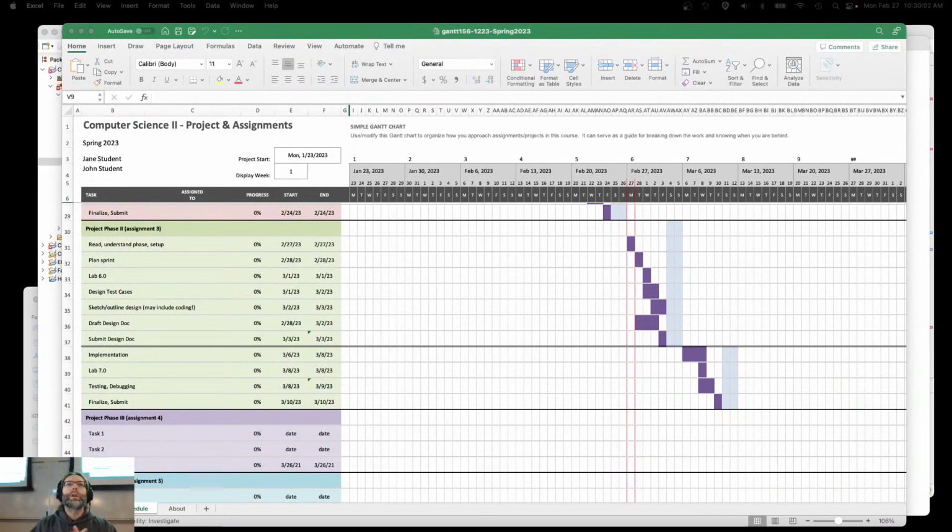All right, so we're starting our third sprint this week. These things are called sprints because it's from an agile software development methodology where you split up work for a larger project or an ongoing project into smaller and smaller periods. Usually it's about 4 weeks, but of course, since this is just one semester, our sprints are about 2 weeks.